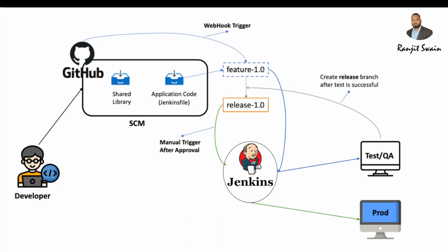That is how the project delivery is managed. There will be sprints, and each sprint will be two weeks, right? Every sprint we add some tickets which we are going to work on for the entire two weeks. Within that sprint, we have to finish the work of whatever Jira tickets were created. Those tickets will be created by you: what sort of applications, what sort of tasks you're going to execute in a certain period of time, right?